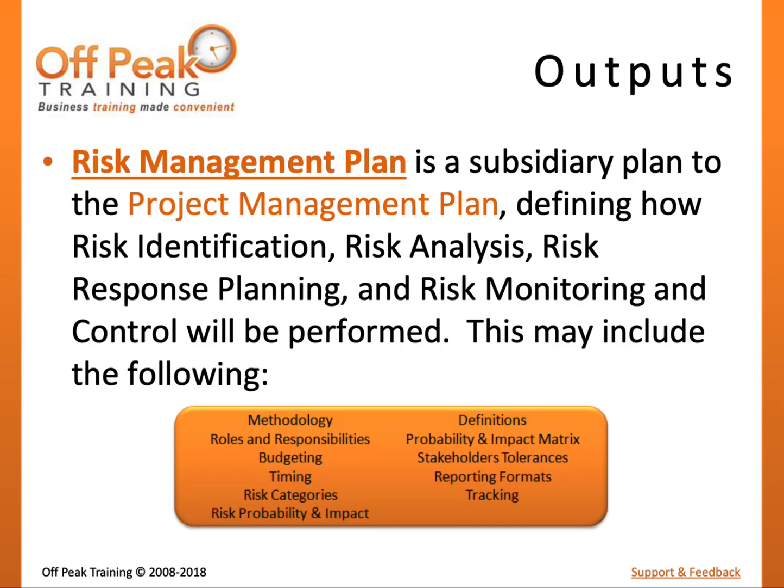There is one sole output of the plan risk management process. The risk management plan is a subsidiary plan to the project management plan, defining how risk identification, risk analysis, risk response planning, and risk monitoring and controlling will be performed. Some of these topics may be addressed.